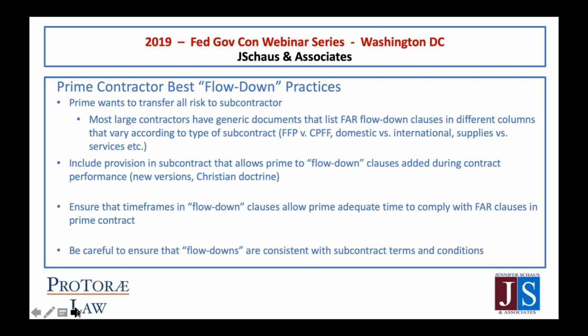So here are the best practices. As I said, most primes want to flow everything down. And there's nothing wrong with that from a prime contractor's perspective. You might want to have the ability to amend that per the Christian doctrine, so say that up front, but ensure that the timeframes that are flowed down are adequate for you to meet your obligations. So if you have to submit something in 30 days, don't have the subcontractor submit it in 30 days, have them submit it in 20 days to you.